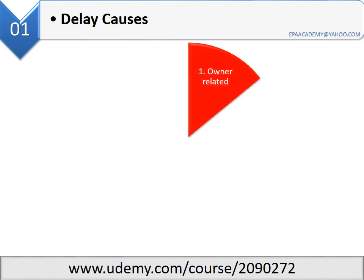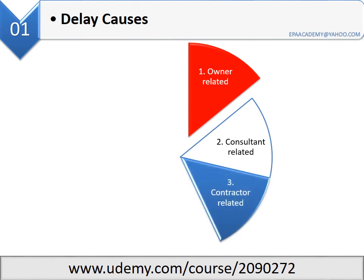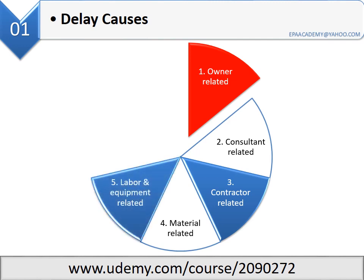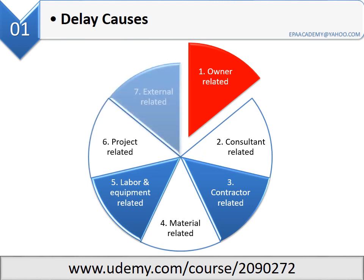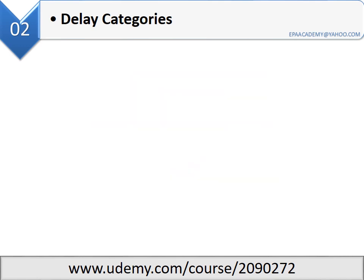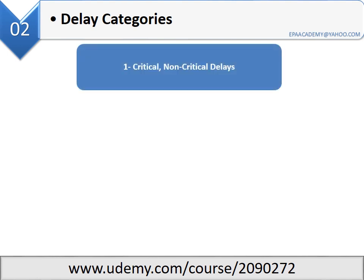First station: delay causes. There are seven main factors that cause delays in construction projects: one, owner-related factor; two, consultant-related factor; three, contractor-related factor; four, material-related factor; five, labor and equipment-related factor; six, project-related factor; seven, external-related factor.